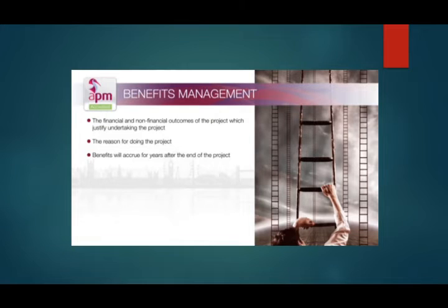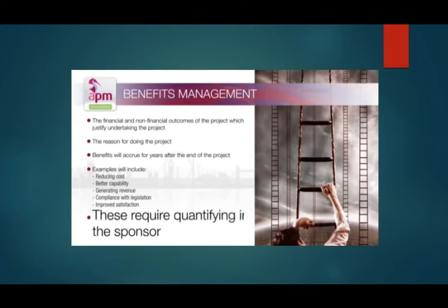For example, an airline may have a project to commission a new type of aircraft. This will be in use carrying fare-paying customers for many years after the project has been completed and the aircraft delivered. Examples of benefits include reducing costs, such as by introducing new technology, better capability, such as enabling more flexibility as a result of enhanced staff capabilities, generate revenue, such as sales of new products, compliance with legislation to avoid penalties for non-compliance, and improved satisfaction to maintain our customer base. The benefits need to be measurable and will become an important component of the business case, enabling the sponsor to ensure the project is and remains viable.